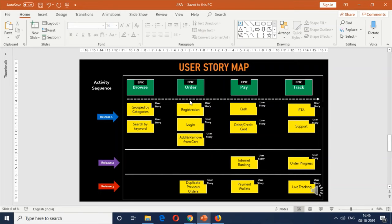The user story map also has a prioritization section: user stories are grouped into Release 1, 2, and 3 based on business value. Release 1 is the MVP — the minimum viable product — the minimum features needed to go live. These stories are grouped as Release 1. Let's see how to arrange this in the Jira tool. Back in the product backlog, we can see 14 user stories tagged to the appropriate epics.